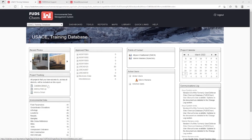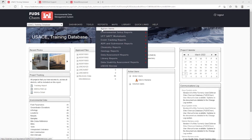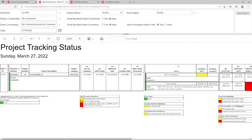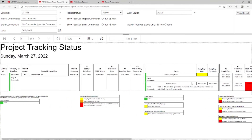The steps of your project workflow can be tracked in the Project Tracking Report found on the FUDSCHEM dashboard, or under Reports > Event Tracking Reports > Project Tracking Report. It conveniently highlights cells that are approaching the recommended completion dates. For example, if the sampling event is within 90 days and the EQAP has not yet been approved, the report will highlight in yellow to alert you. Refer to our Project Tracking Report Overview for more information.